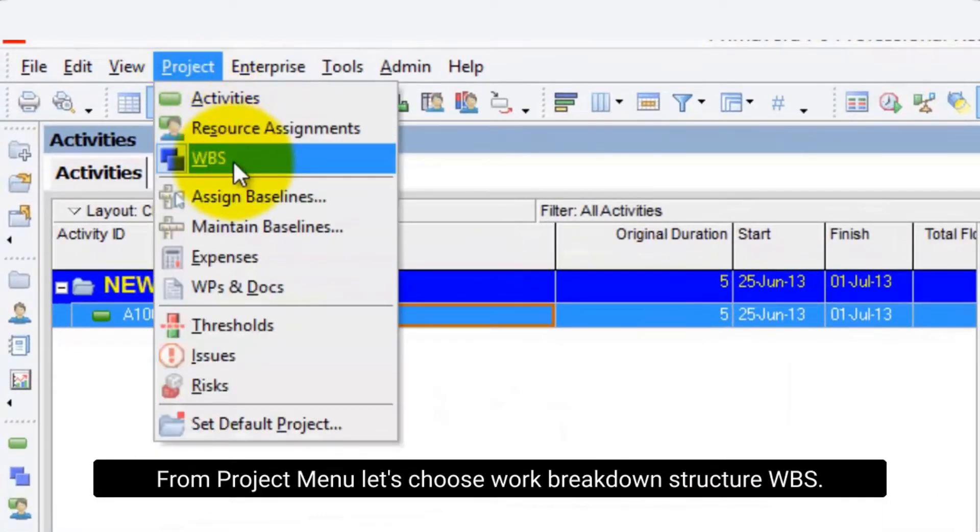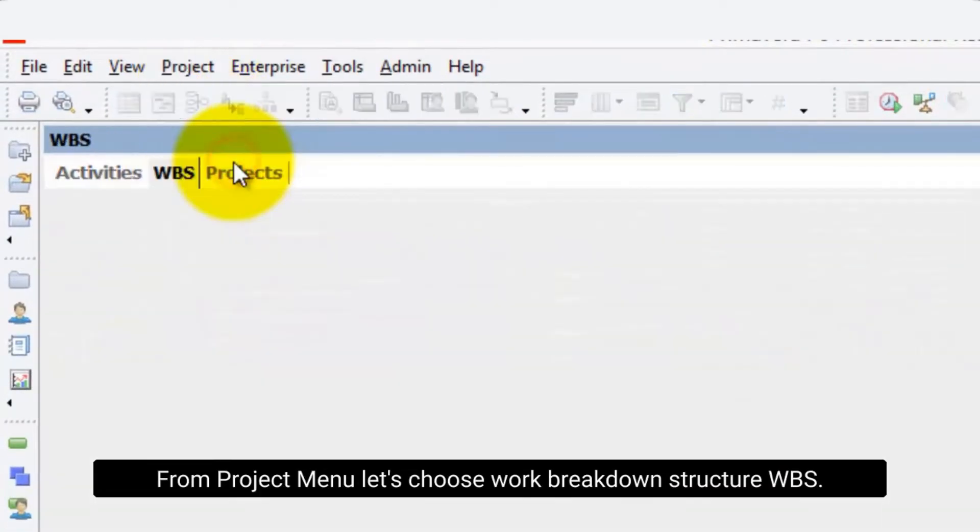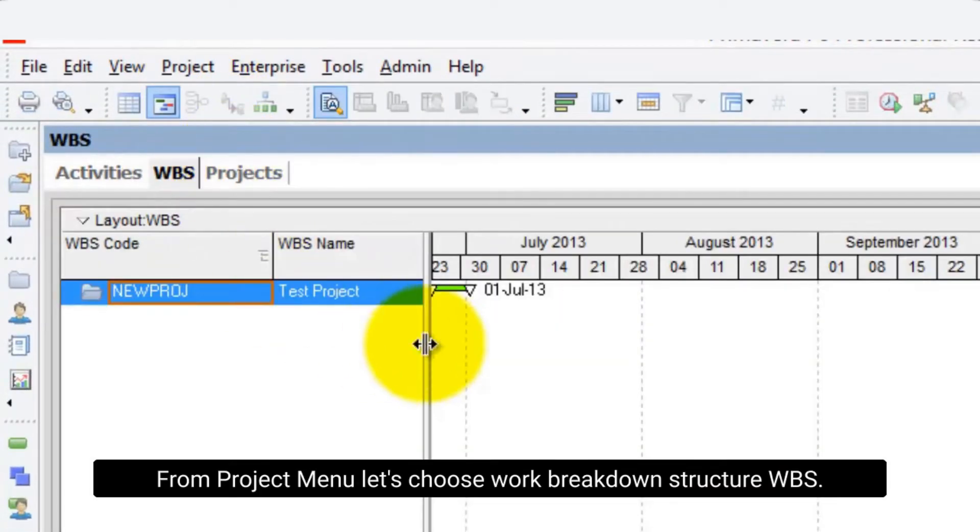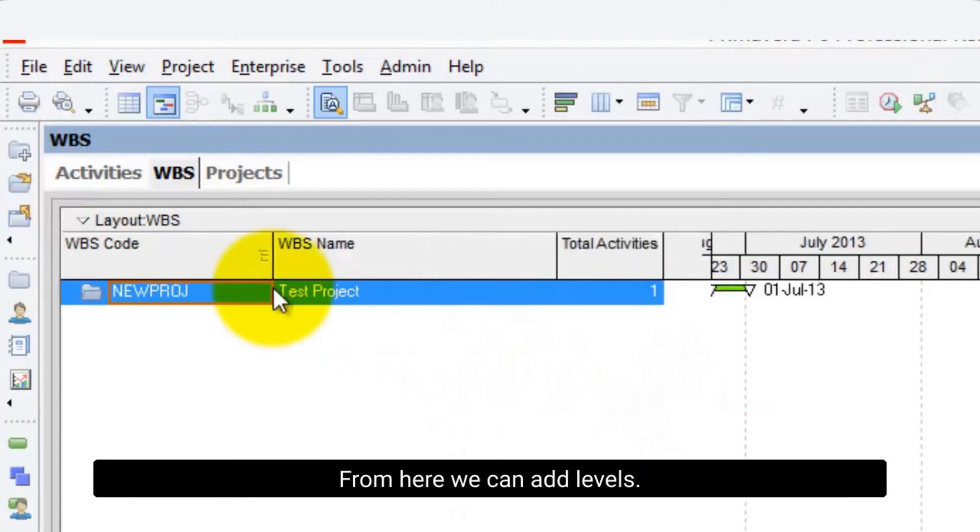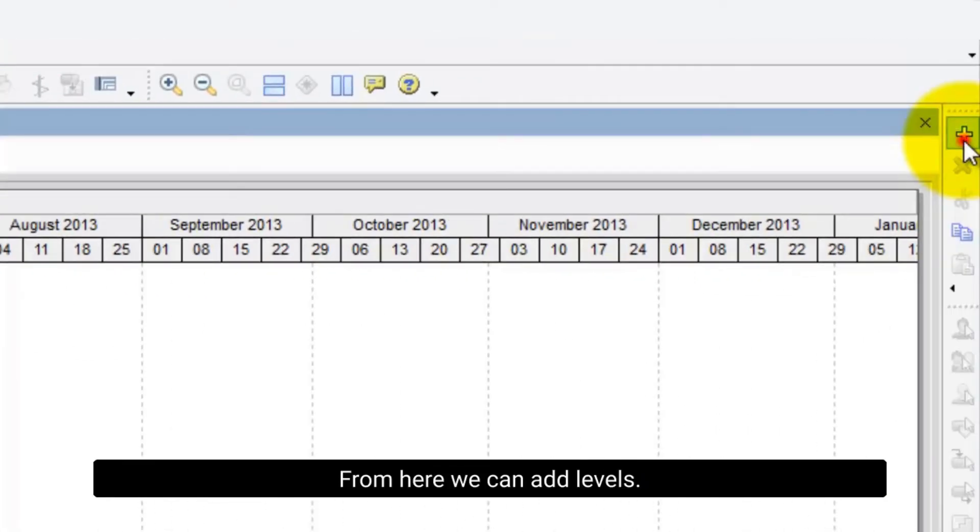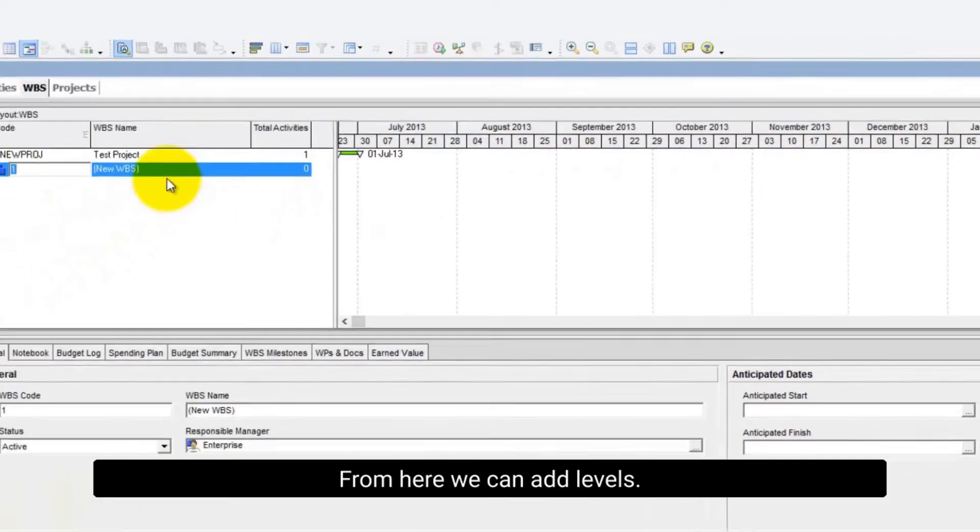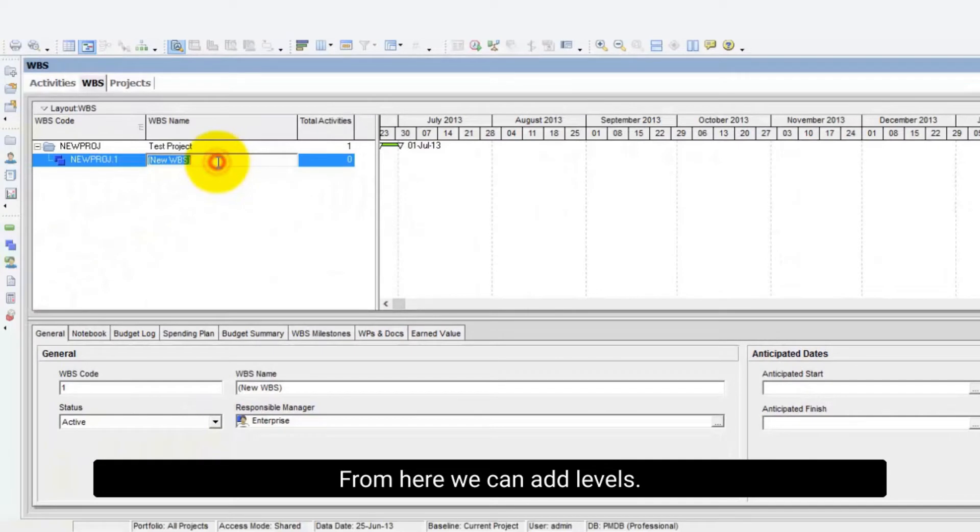From project menu let's choose work breakdown structure WBS. From here we can add levels. And we can call it Earthworks.